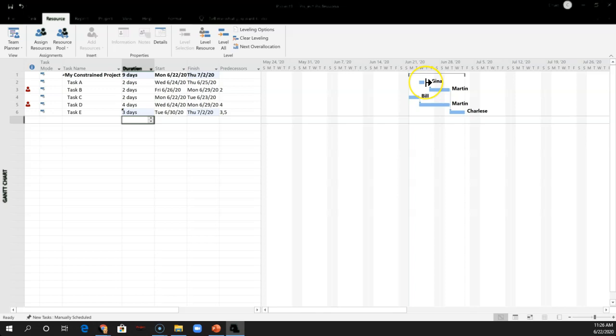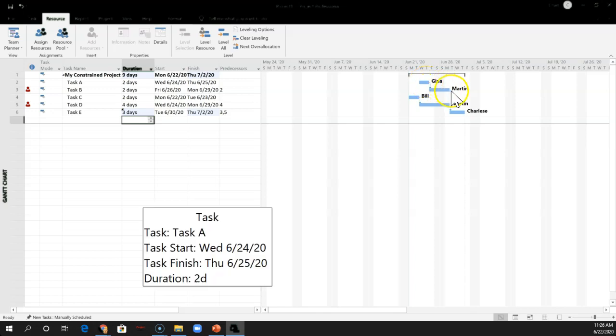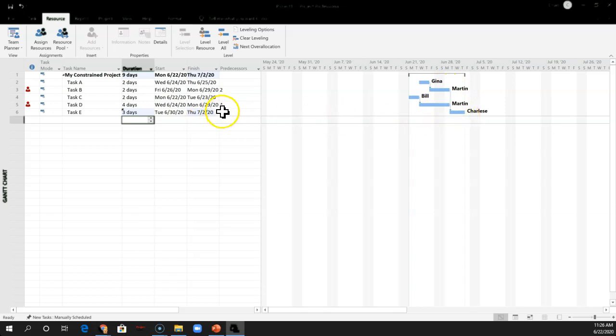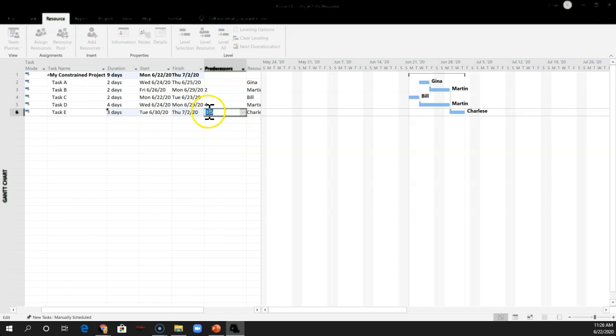So the feeder buffer has to go into the critical path here. It's on the dependency between the non-critical path and the critical path. So the dependency on the predecessors is from task 3 to task 6, or from task B to task E. I have to add it where that dependency is, and that's a mistake that people make.